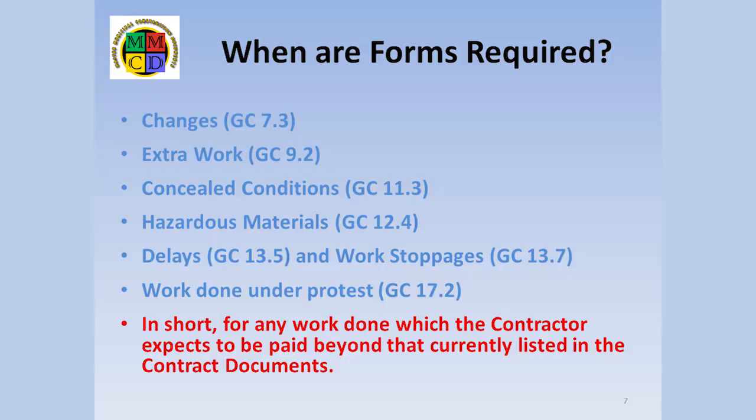The general conditions require a contractor to submit force account forms daily whenever work is being done that the contractor expects to be paid beyond that which is already agreed in the contract.